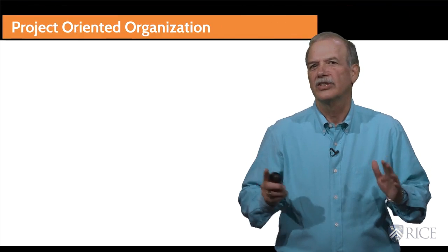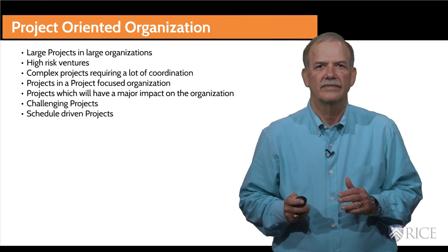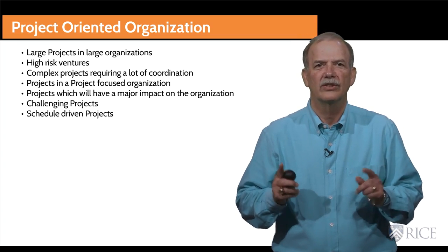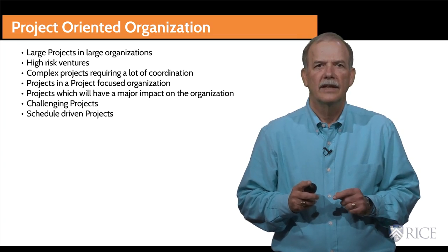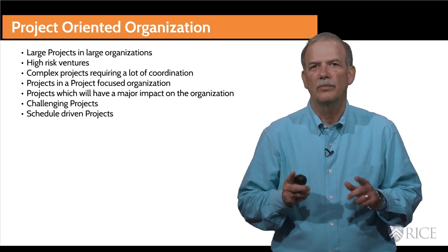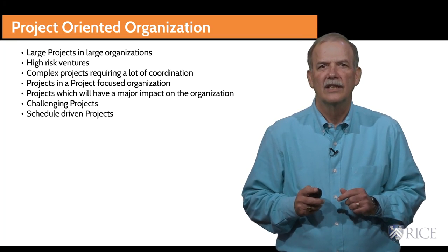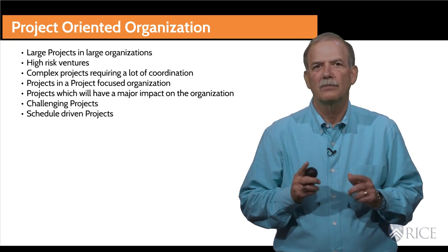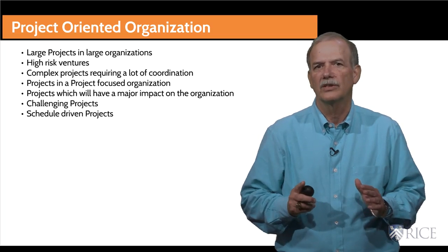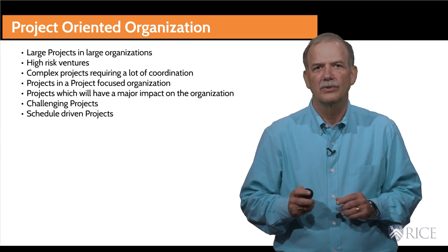The final organization type we're going to review is the project-oriented organization. We typically see this organization used on longer duration, larger projects. It is particularly appropriate for high-risk projects that are strategically important, where a highly focused team can make all the difference. We see this organization style particularly in project-based organizations that execute large, complex projects in remote locations or projects that involve multiple units.